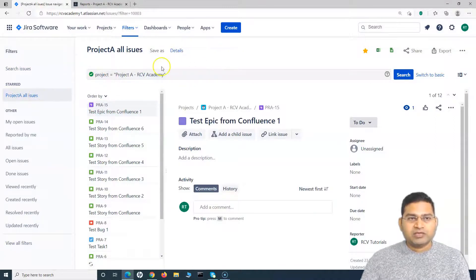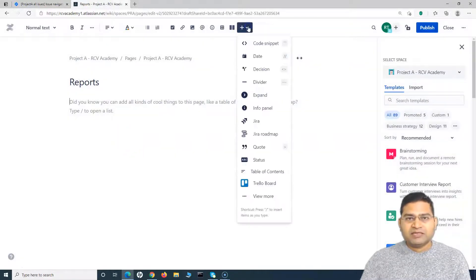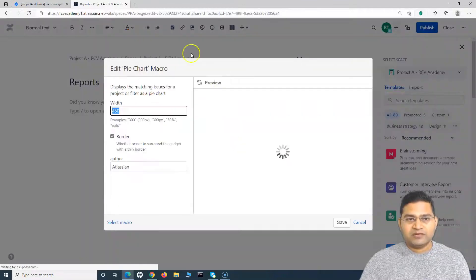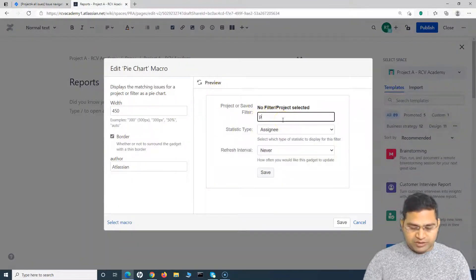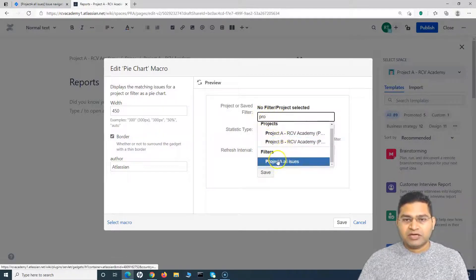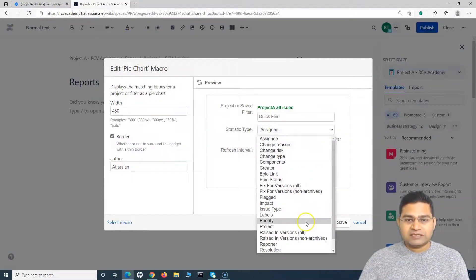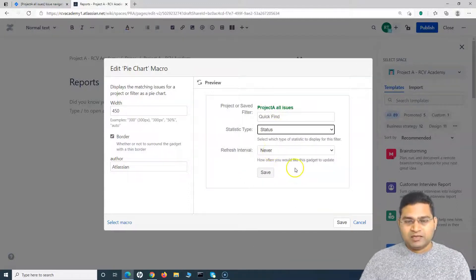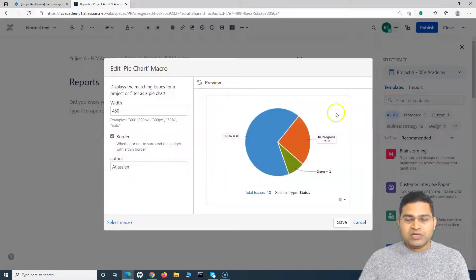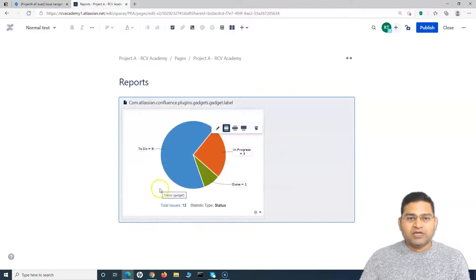Back in Confluence, you can select the pie chart from the dropdown or use the shortcut — type a forward slash and type 'pie' — and the pie chart macro will appear. In the preview window, start typing the filter name 'Project A' and it will display the matching filters. Select the filter, then choose the statistic type — I'll choose Status. Set the refresh interval (e.g., every 15 or 30 minutes, or never) and click Save. The status pie chart will appear on the page.